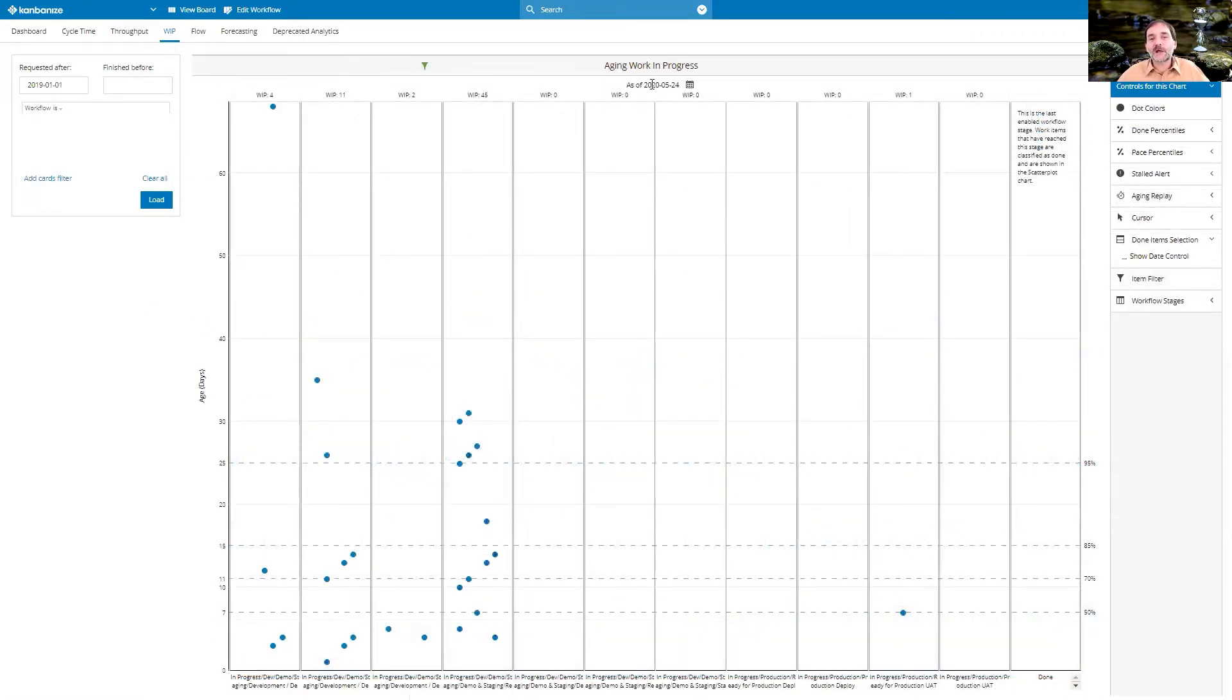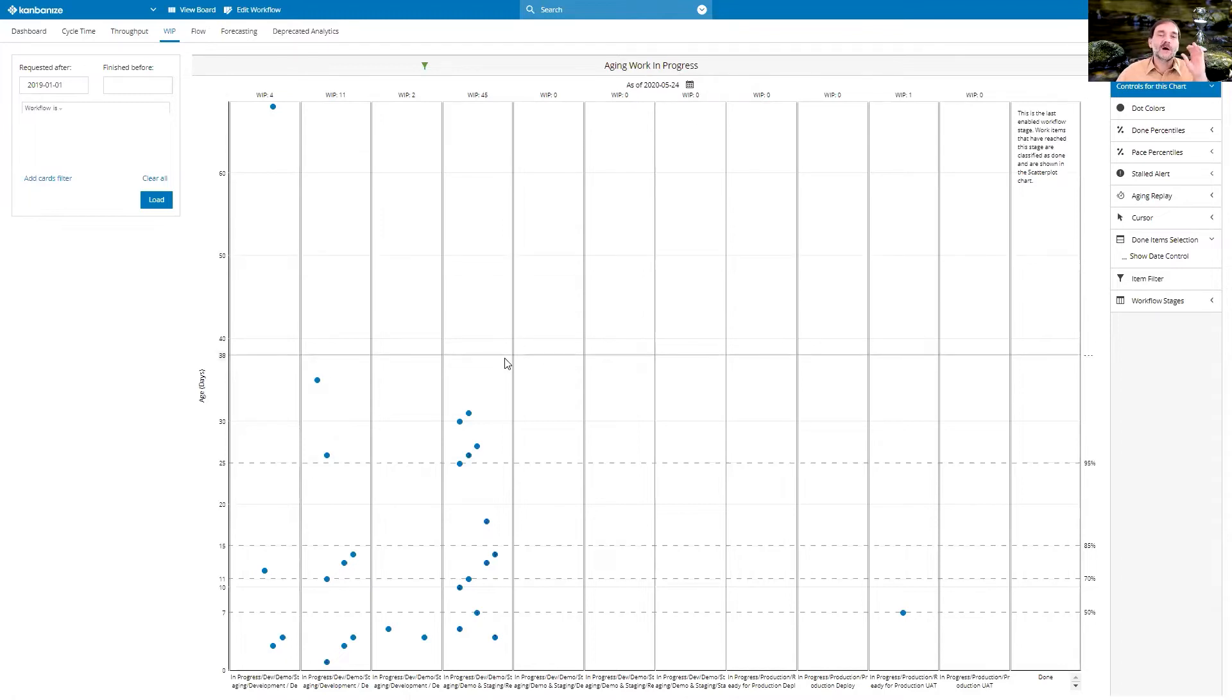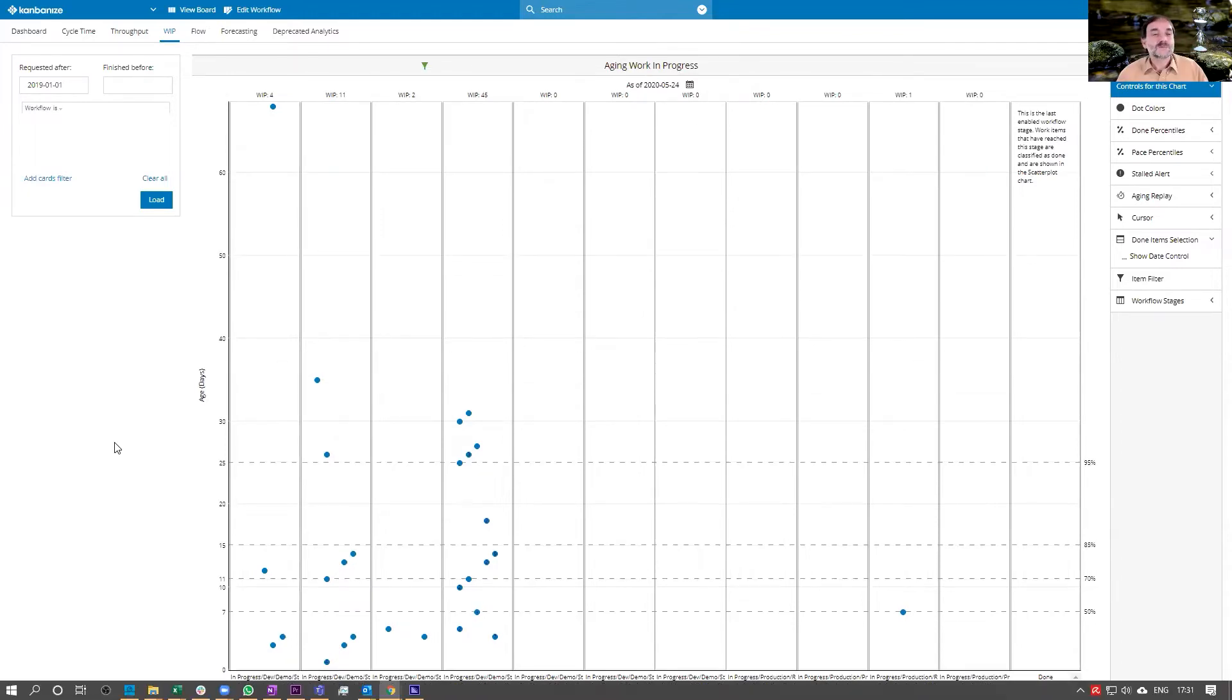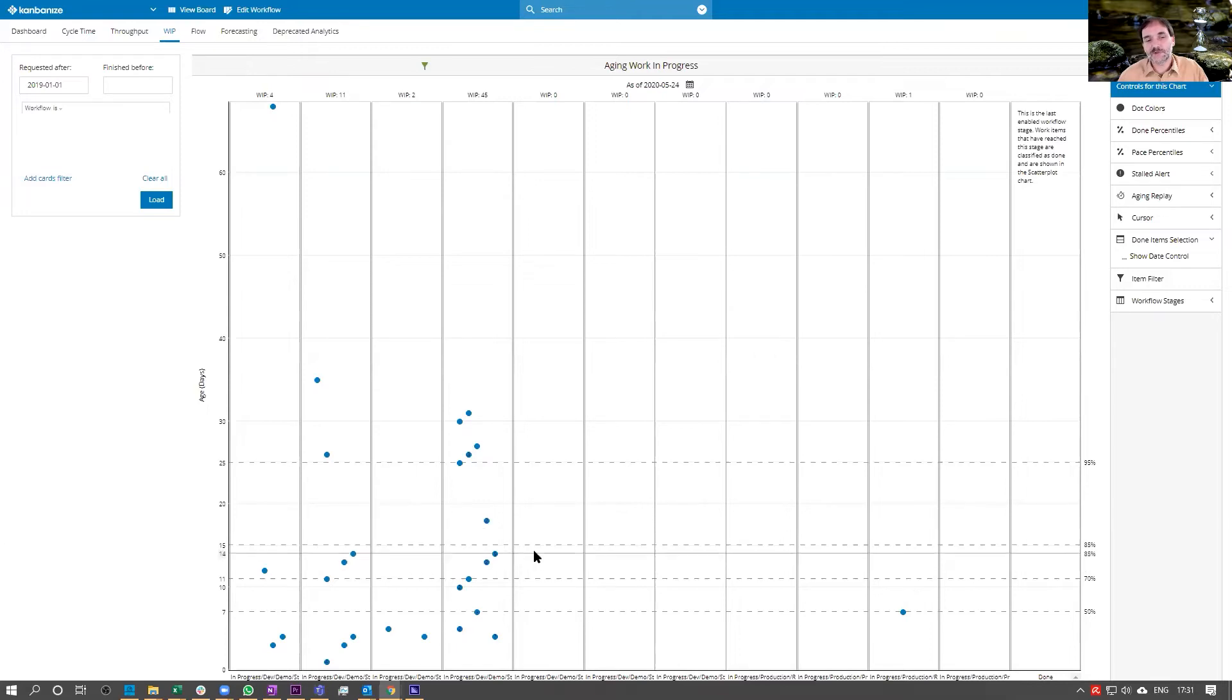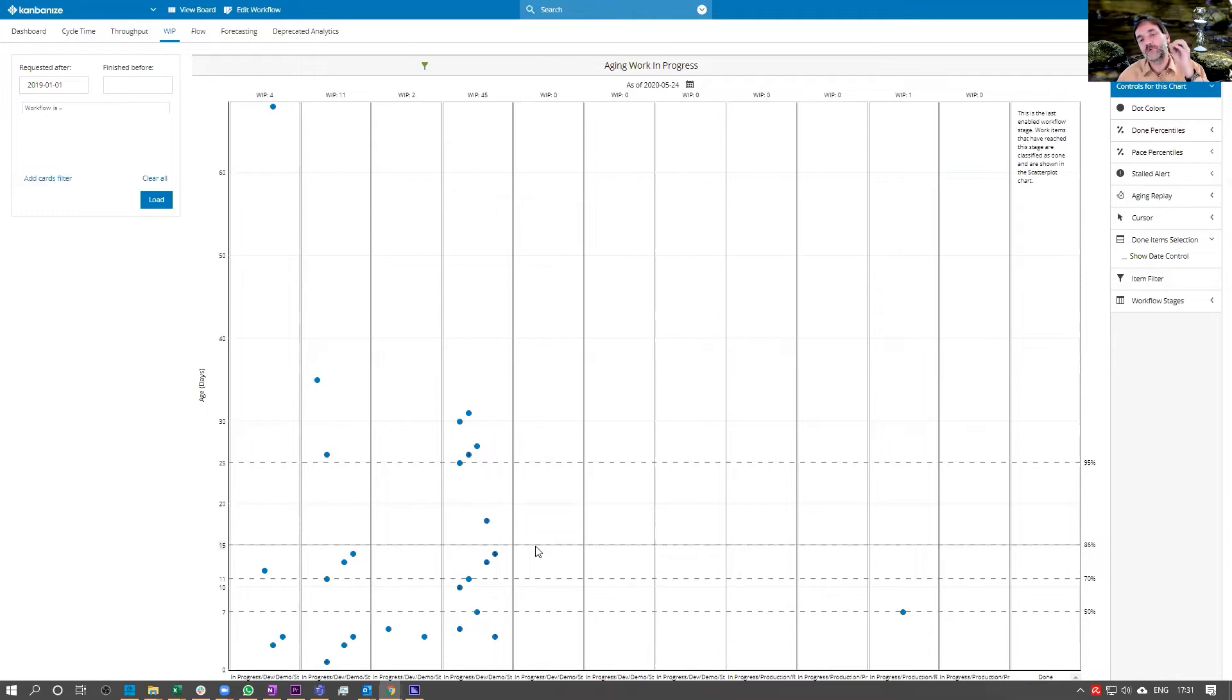Let's now look at the aging work in progress chart as of that date where we had 63 items in work in progress. As we can clearly see, most of the work is actually sitting in the first third of the process, and a lot of it is already sitting above the 85th percentile when we would have expected it to already be finished.